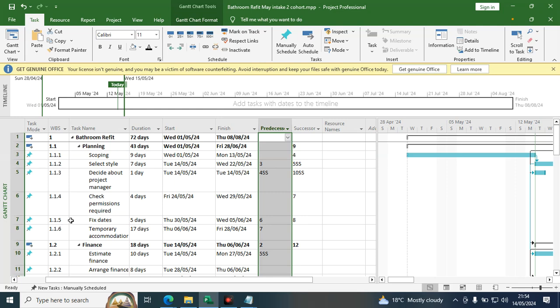If you move, for example, to the electrical engineering field, they are experts. They understand how activities will flow. You cannot start wiring before you do procurement and so forth. So there is a certain order, and that order is what you have here as predecessor and successor tasks.